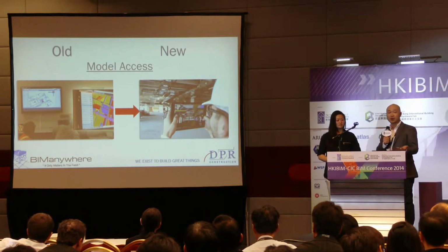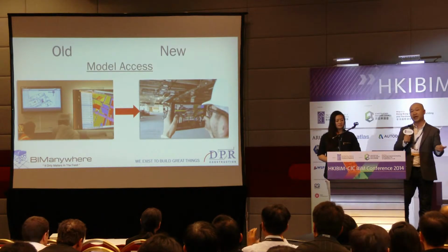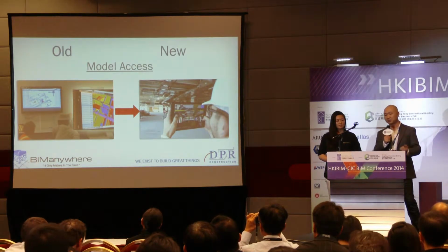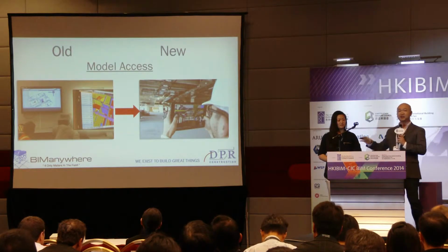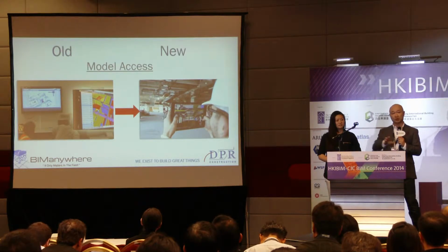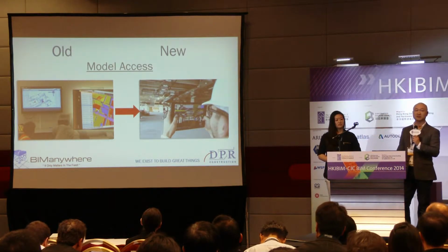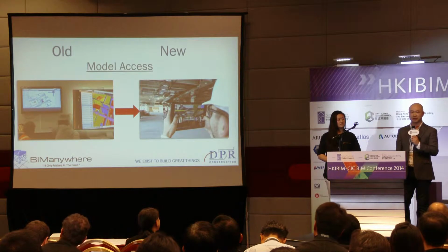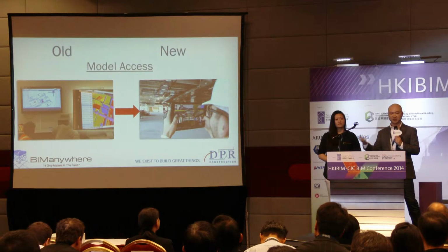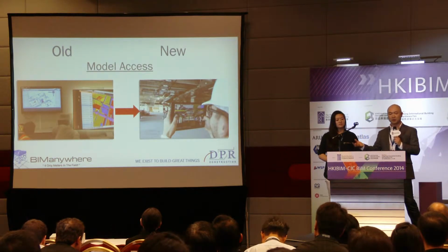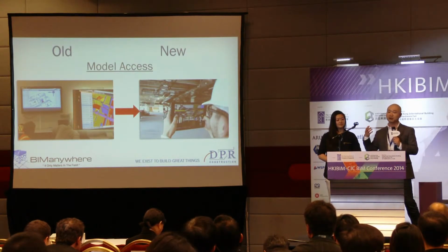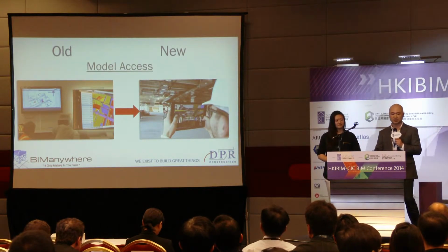Also, on model access, it's very common in the US to have BIM caves or iRooms where people huddle up. You have a BIM specialist dedicated to navigating the model. So whenever someone wants to look at the model, they go to this room and grab a BIM specialist as their pilot to visualize certain areas. With mobile technology, you can visualize the area where the work is going to be installed right there on the spot, and that provides a lot more value, increases the quality of work, and reduces mistakes.